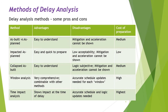Window analysis is very comprehensive and has the advantage that it can be combined with other methods. The disadvantages are that accurate schedule updates are needed for each of the windows, and the cost of preparation is high. For Time Impact Analysis — perhaps the only method where you can identify mitigation and acceleration — it also needs very accurate schedule and logic updates, shows the impact at the time of the delay, and has the highest cost of preparation.